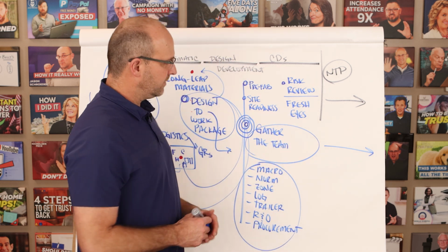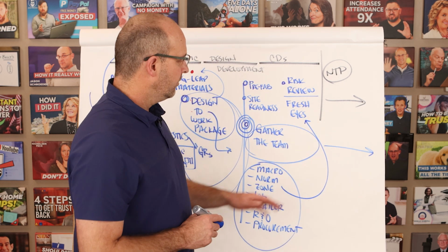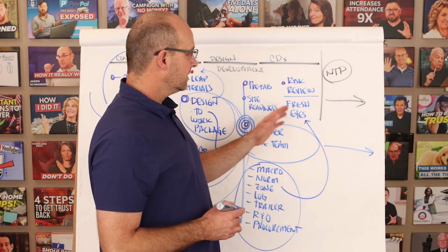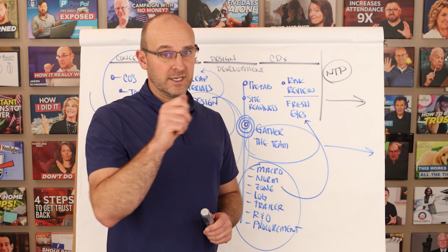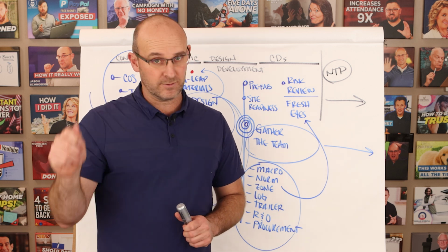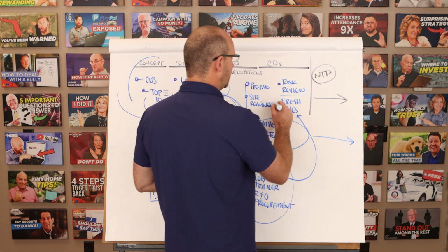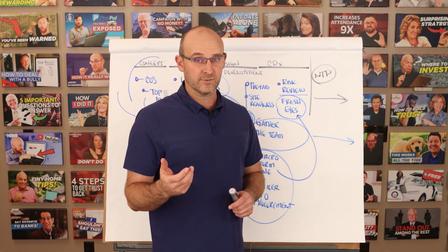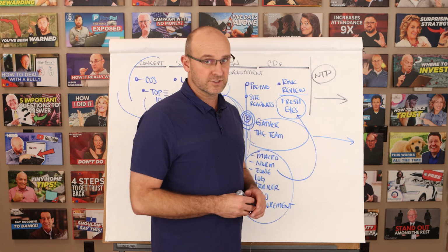We get all of this planning done so that we can pull this into a fresh eyes meeting where you gather multiple people with many years of experience to literally do what they call Pixar planning: review and tear apart the plan, redo it. Review and tear apart the plan, redo it. Basically, you're making sure here that the plan is solid on paper before you build it in the field, right? Because projects don't go wrong, they start wrong. We have to make sure that we're starting right.